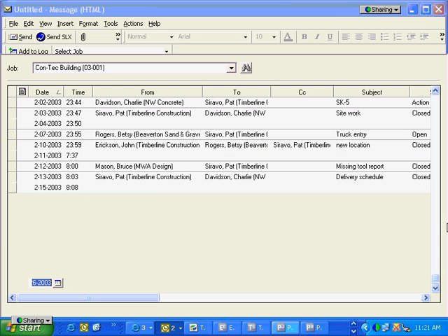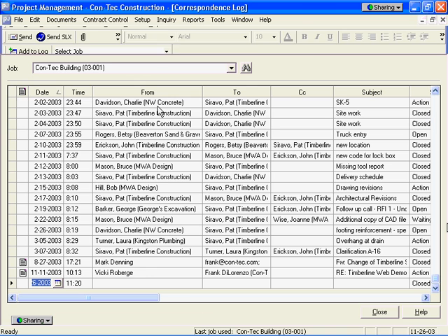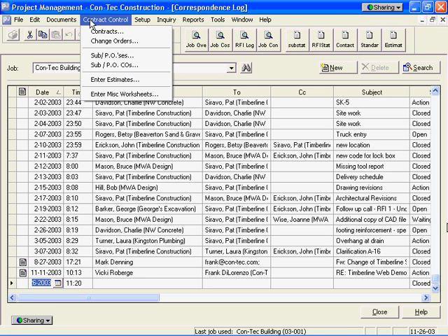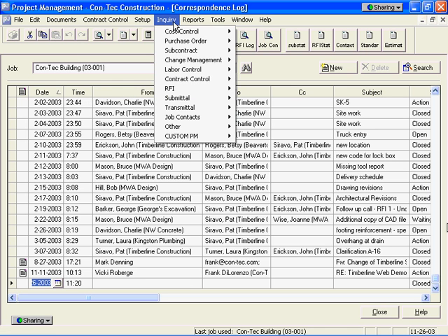Finally, we have the ability in Project Management to allow project or contract administrators to come in and set up their own purchase orders for contracts, enter budgets if they're not flowing in from estimating electronically, key in items like percentage of completion, cost to complete, for variance reporting, set up schedule of values for billing. We also enable them to come in and look at a variety of inquiries or reports throughout the system based on what it is they need to see.